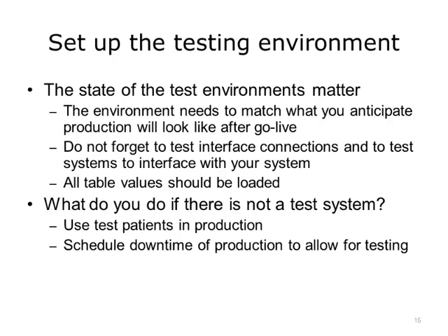The state of the test environments matter. The environment needs to match what you anticipate production will look like after go live. Do not forget to test interface connections and to test systems to interface with your system. All table values should be loaded, so if a patient is admitted to Nursing Unit 5 South in the Patient Management Test System, but 5 South is not configured on the EHR test system, the admission message will fail when received by the EHR test system.